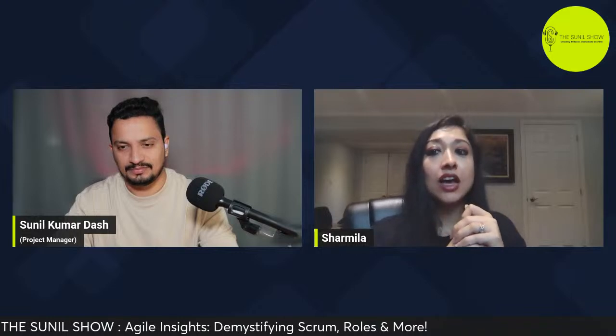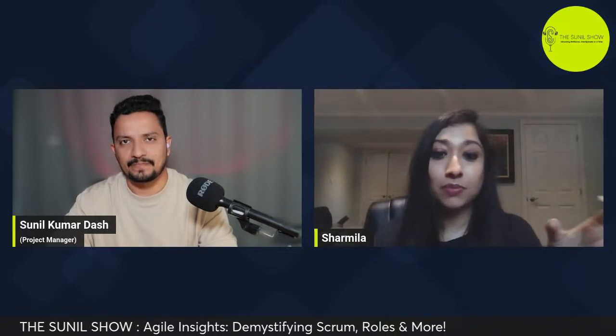But we should not go into depth in the daily stand-ups as to what our issues are. That might lengthen the time of the daily stand-up meetings. Rather, what the Scrum framework suggests is that once you know these are some of the impediments your development team is facing, the Scrum Master can have a one-on-one conversation with those members to understand more about the impediments and have them fixed, right? So it's about time-boxing and what we should mainly discuss in the daily stand-ups, and encouraging and motivating the development team to follow only these pointers and park those lengthy discussions for later.